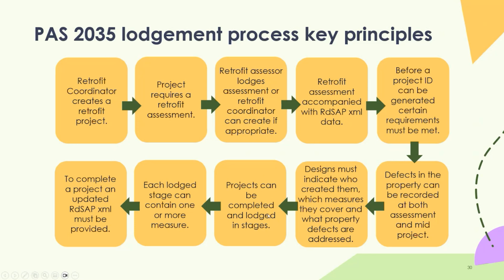So a project can be completed and lodged in stages. Each lodged stage can contain one or more measures. To complete a project, an updated SAP, so that's a kind of EPC type of assessment, must be provided. It's not an EPC, but it's all but in name.